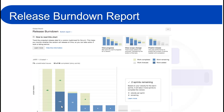The light green segment represents the completed work during the sprint. The light blue represents the remaining work in the version or release after the total work estimated at the start of the sprint. When you combine the light green and light blue segments together, they represent the total work estimated at the start of the sprint. The dark blue area represents work added during the sprint that was not part of the original scope, and together the dark and light blue areas represent the total remaining work at the end of the sprint.